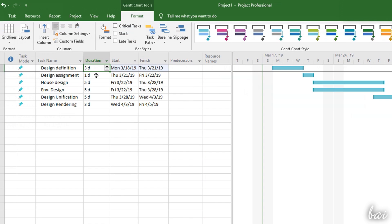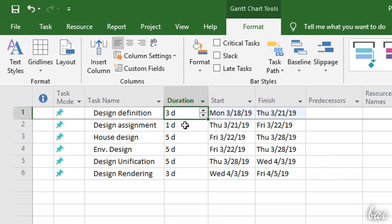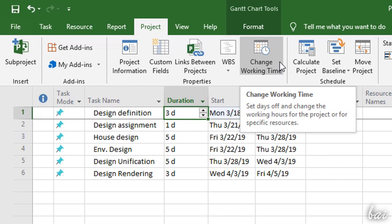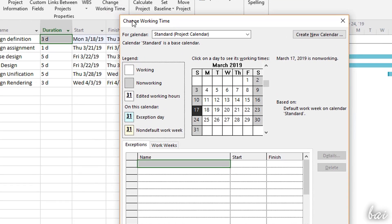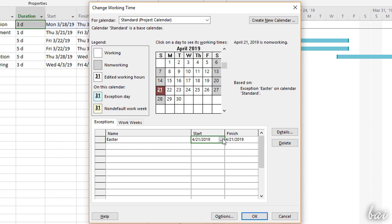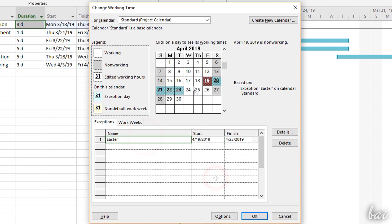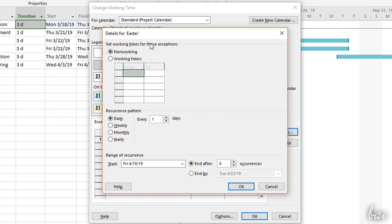To change the non-working days and insert national holidays, go to the Project tab, and then to Change Working Time. Below, under Exceptions, you can add special working or non-working days with any recurrence if you need, for example, to add holidays, special meetings or conferences.